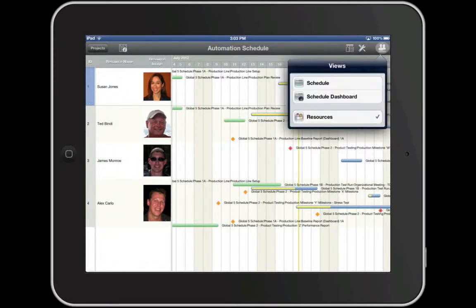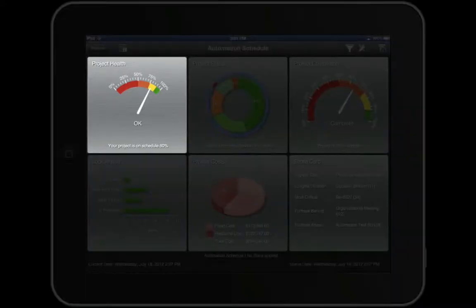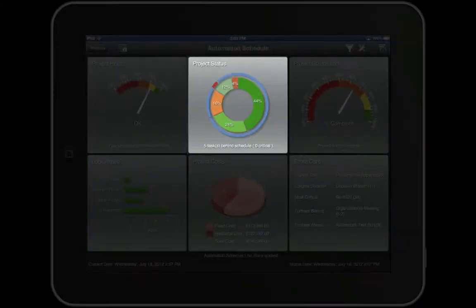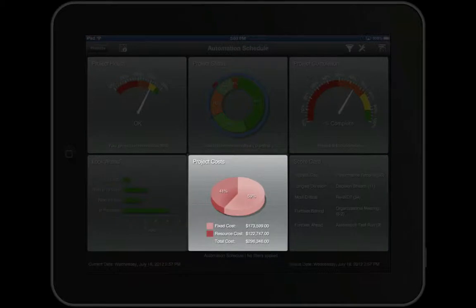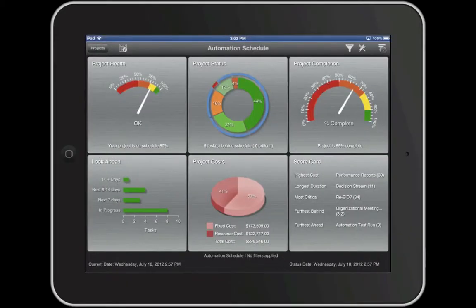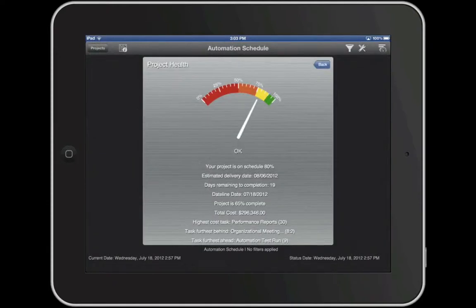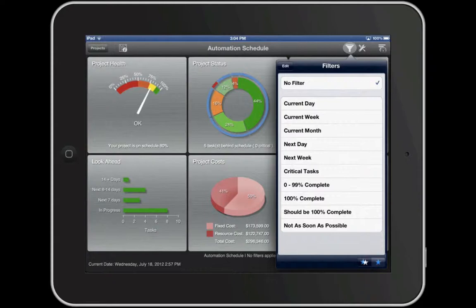The last view in FastTrack Go is the Schedule Dashboard. This feature, which is only available in FastTrack Go, delivers six key scheduling metrics to help manage expectations: project health, project status, project completion percentage, project look ahead, project costs, and scorecard. Not only do these dashboards provide you with an executive view of your project, but tapping on a dashboard reveals additional information. Combine them with filters for pinpoint accuracy of the tasks that affect your project success and bottom line.